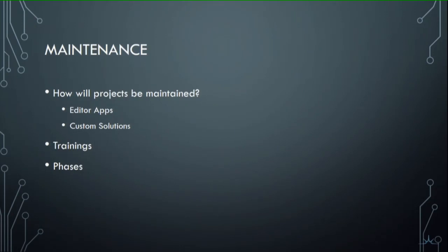Now, there are going to be some cases where there are a lot of projects getting updated and people have this detailed project data set that they're already keeping and they don't want to do dual entries. So there is the possibility for some custom solutions where, for example, public utilities might have their own editor app that they're editing their more detailed data set in. And then maybe nightly we would script truncating the public utilities projects out of this data set and appending in the latest update of their projects. So that would allow them to only have to maintain it in one place, but we would have the most up-to-date projects nightly. And so we would still get the best out of both worlds. They could keep all their additional details that they need, but we see just what we need for this project.